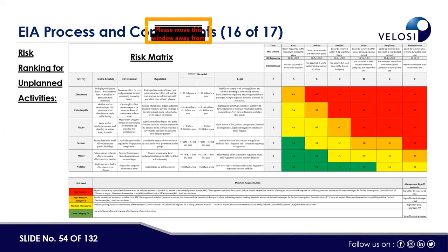In some countries, there is another component, that is public consultation as well. In public consultation, we have to consult the public, and even in some countries, there is a public hearing after submission of the environmental impact assessment to the authority. If it is a significant environmental impact and there is a concern from the community, then we have to arrange a public hearing in which the government officials will be available, and then we have to hear from the community around the project so that we can resolve their concerns.